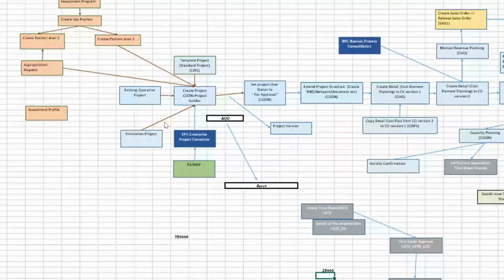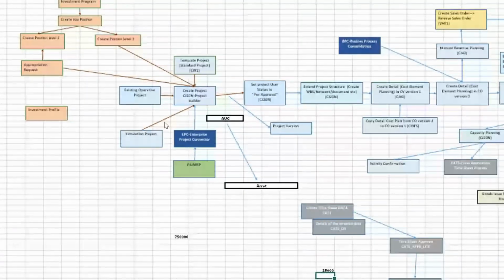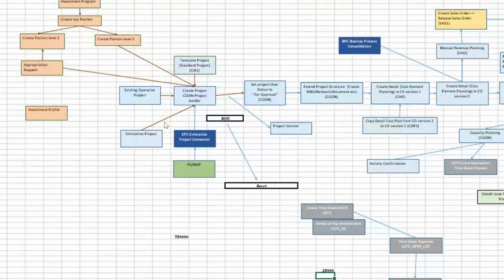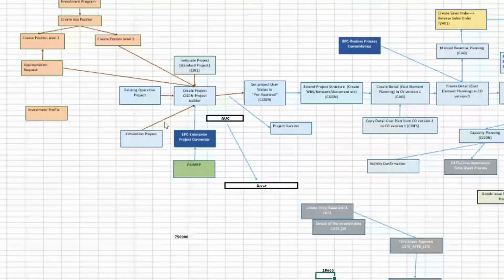Once the budget is allocated, then with reference to that, I need to ask my procurement team to start the procurement for me. In the case of a construction project, I'll procure majorly bricks, steel and cement. These are the three materials, and apart from that I need some services. For example, I need plumbing services, internal plastering services, civil services, electrical works, and mechanical works. So all these services I need to procure.